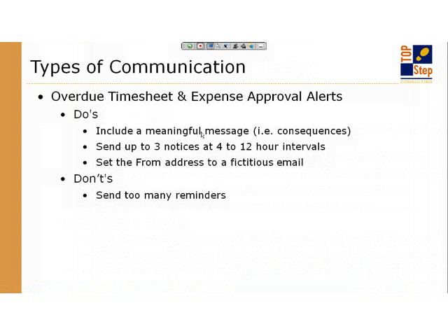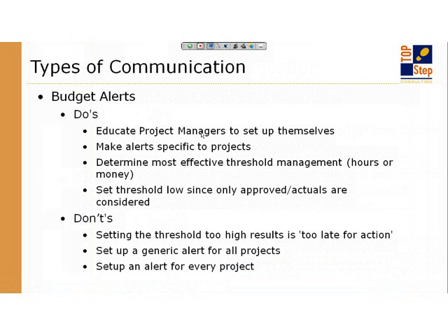Now the budget alerts. I don't think the budget alerts are actually used as much as they could be, and I do know why most people are not using them. Budget alerts to most people mean that there's some kind of proactive action that should be taken to monitor whether a project is getting near the end of its budget or getting close to burning through all of its budget. Okay? The budget alerts in OpenAir actually depend on actual data. When I say actual data, I mean actual approved data, which is where the challenge comes in.